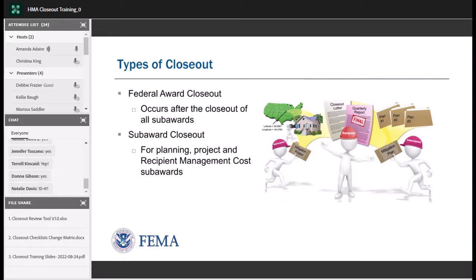Each disaster or non-disaster can be referred to as a federal award. For HMGP, we normally call those disasters. Underneath all those awards or disasters are the sub-awards — all the plans, projects, and recipient management cost awards. When we get to the end of the period of performance and the closeout liquidation period, the recipient will begin sending us sub-recipient closeout requests. Once all sub-recipient closeouts are complete, we can begin the federal award closeout, which closes out the entire disaster award.